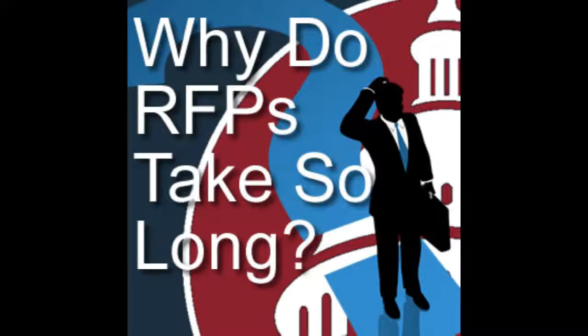There are lawyers who are going to look at that. Depending on who the source selection authority is, if it's not the contracting officer, they're going to look at that. That's a major change. That's going to take a couple of conversations, and because this is a large organization, there's probably a PowerPoint slide deck involved. So there's a bit of a time commitment there. So it isn't something they just simply say, okay, well, what do you think? Flip a coin, let's go. There's a lot of decision process that goes into it, and all of that eats up time. And I know when you're outside the process, it feels 10 times longer than it actually is.